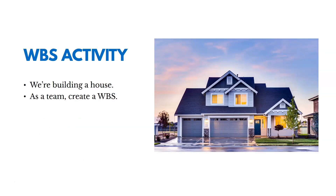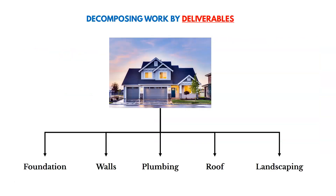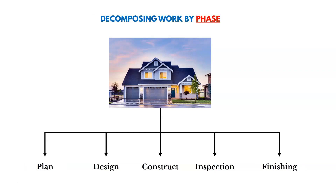Let's use an example of building a house to create a WBS. We can decompose the work by deliverable: the foundation, walls, plumbing, roof, and landscaping. We could also break it down by phase: planning, design, construction, inspection, finishing. Both are acceptable ways of breaking down the work on a project, and it's up to you to determine what would be best.